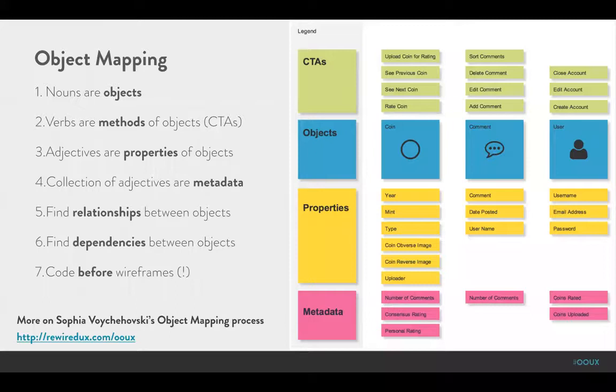In the past, this doesn't even necessarily need to be an MVP or something as large as a project. It could be just a simple component. In the past, I've worked where a user story would come in, a designer would then spend a week developing a component, iterating, going back and forth with the client. And then the following Monday, it would come to us. We'd have to look at it, sort of intuitively start to understand what it is, maybe talk to the client about data contracts.